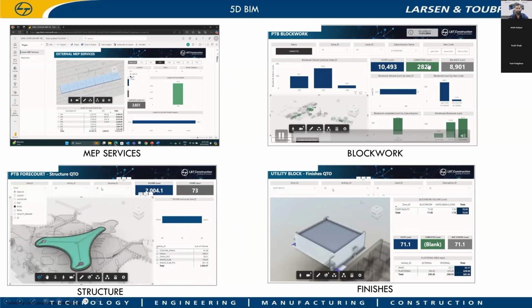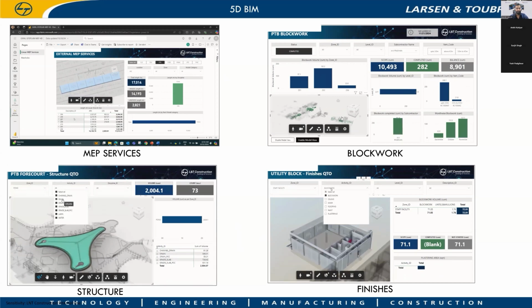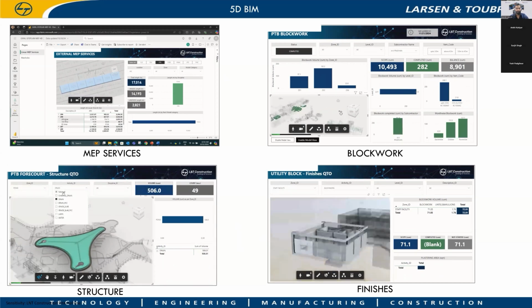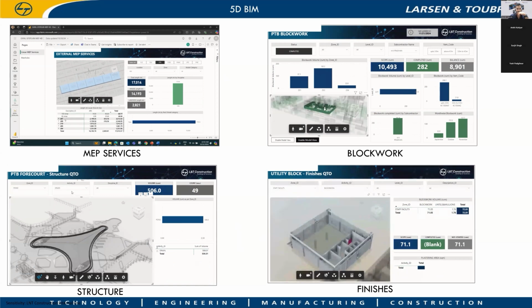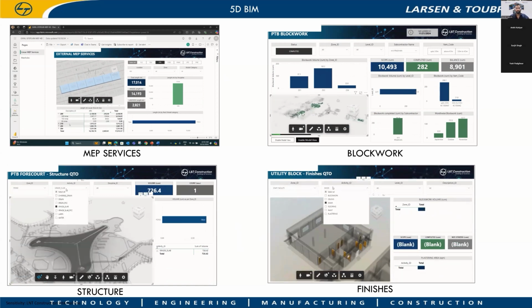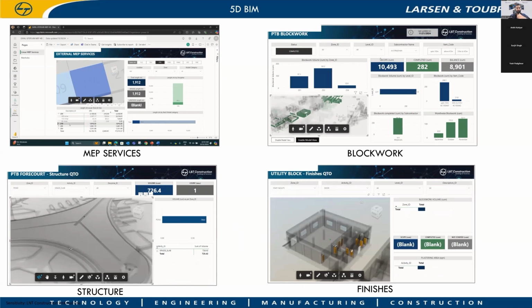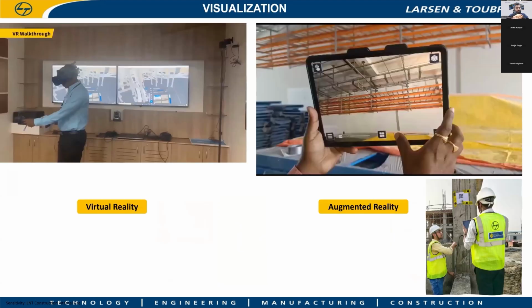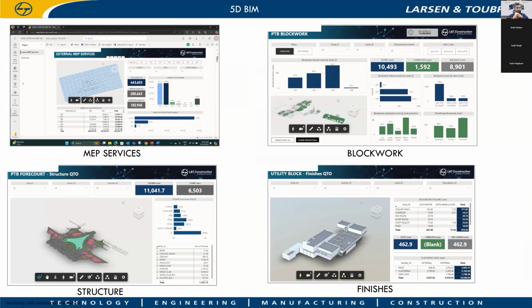So all this tracking system is happening through BIM, and we have the classification system. Through that we can connect the cost into the BIM model, and we can do the cost analysis. The invoicing will also happen from here itself. Information is extracted from this dashboard. Yes, invoices are generated through the BIM model.